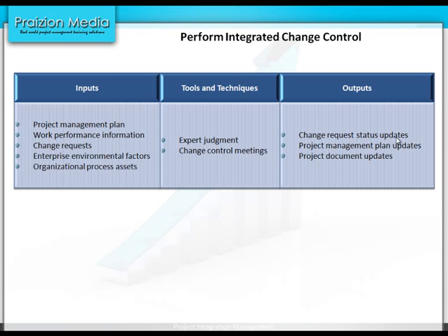Questions on the exam could be centered around how do you manage change? You're given a verbal request for a change. What do you do as a project manager? As the project manager, you are always responsible for taking the request, analyzing the request, and passing it through the right process, the right approach to managing the change.